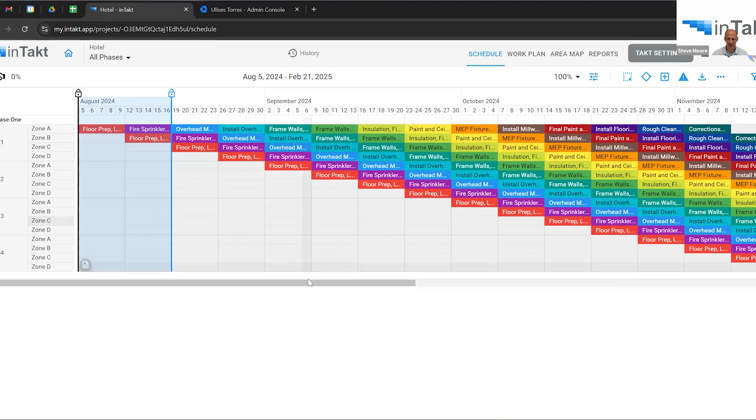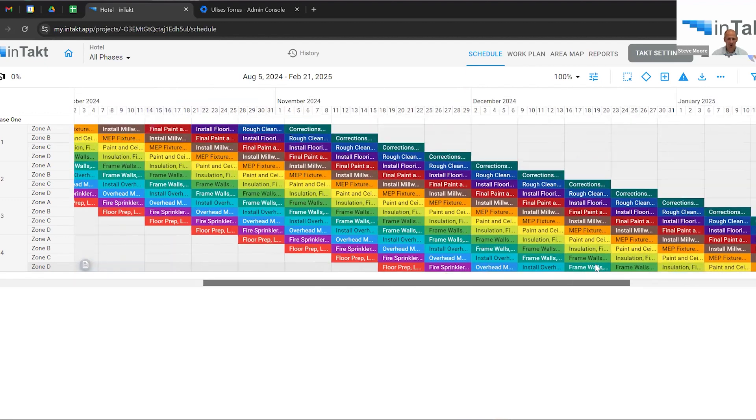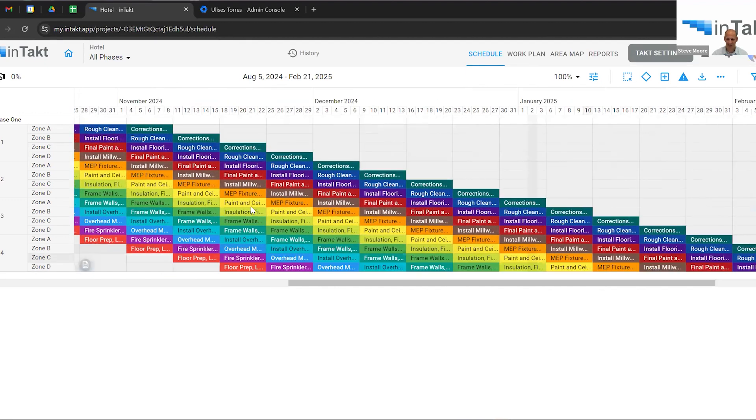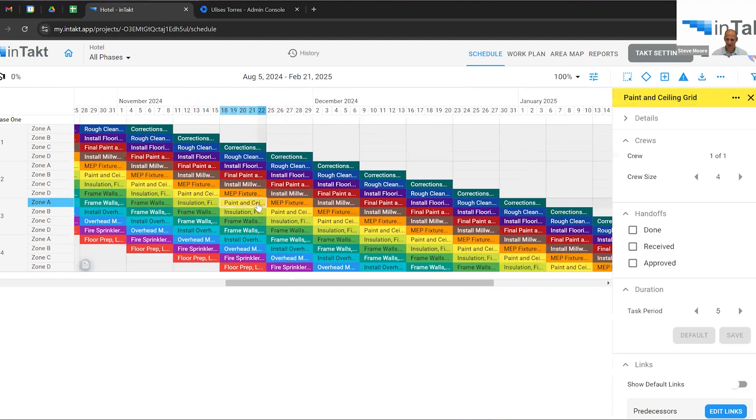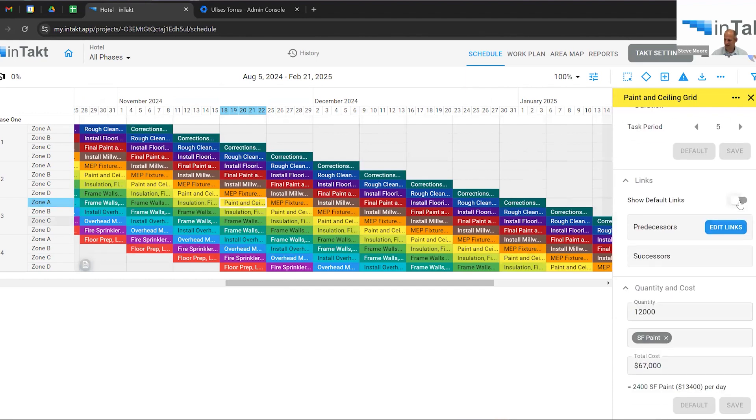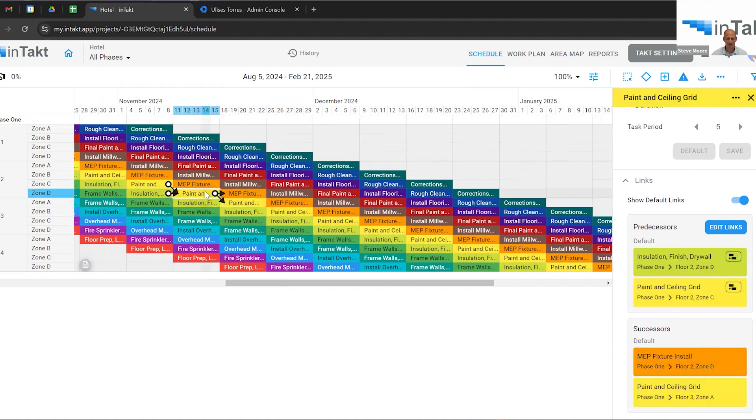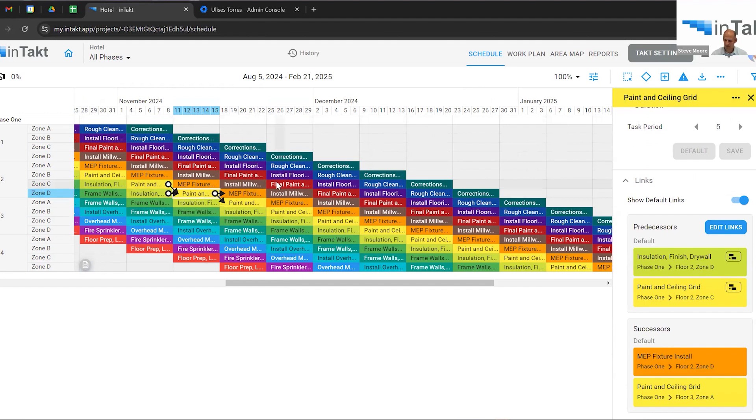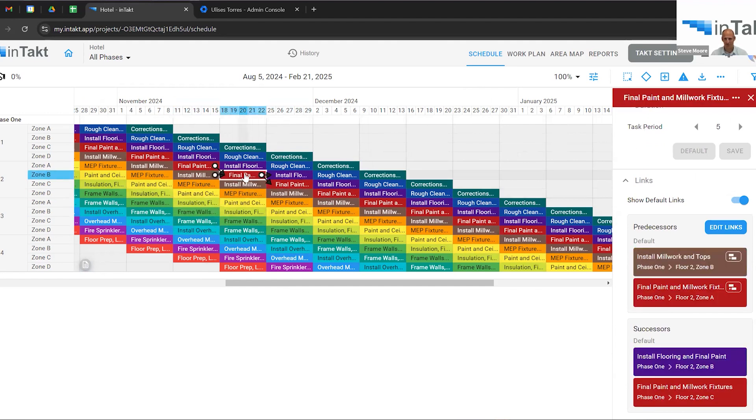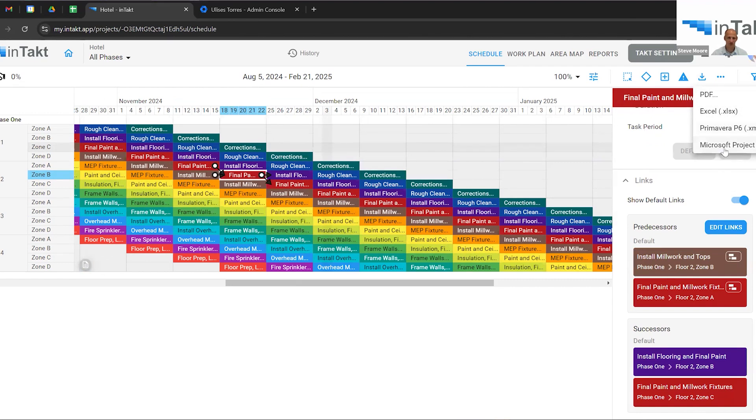Show you how fast it was for me to generate over a hundred activities that are fully linked. So, now I can click on one of these tasks. If I show the links on it, these are all the CPM links that are going to be exported with the project. That makes that dead simple. And just all logic, everything, calendars and all that are baked into that export. So, the export comes from right here, this download button. You can go to PDF, Excel, P6, or Microsoft project.